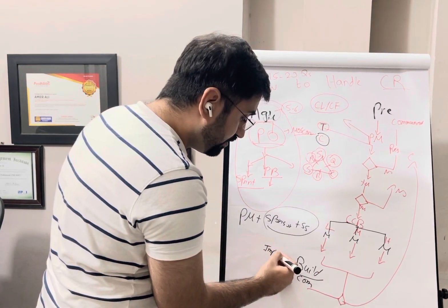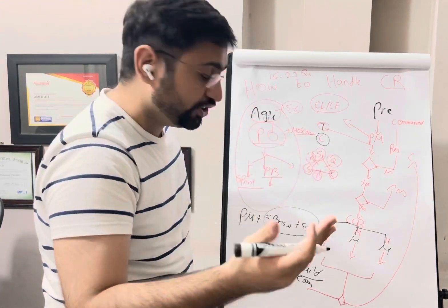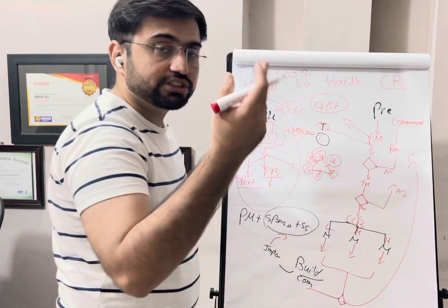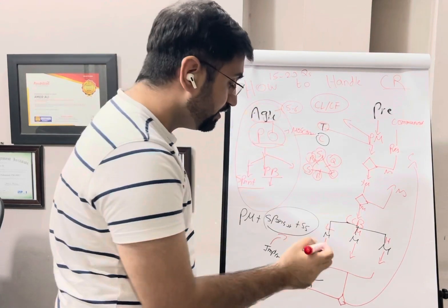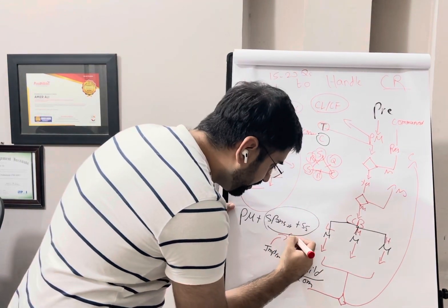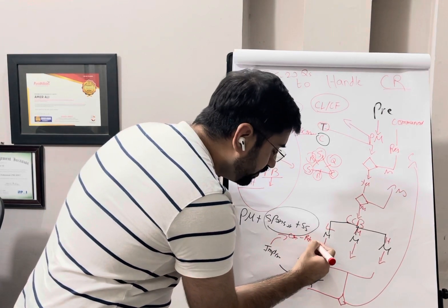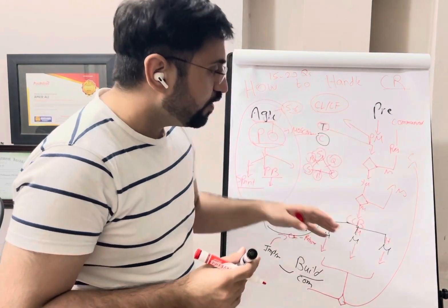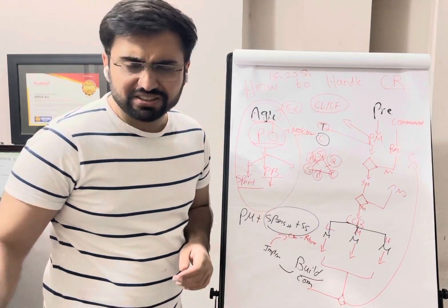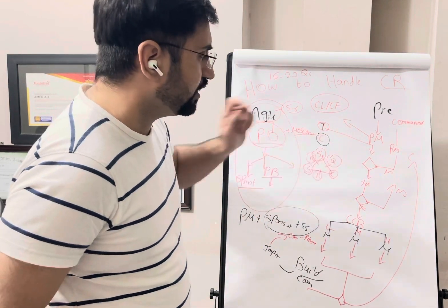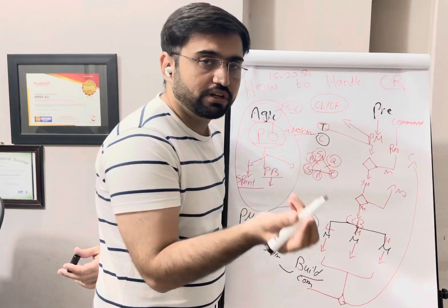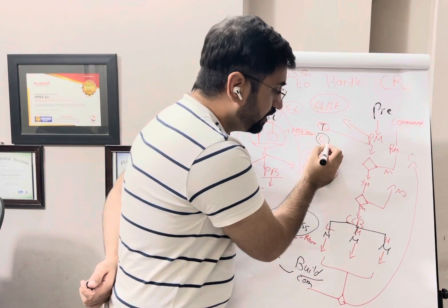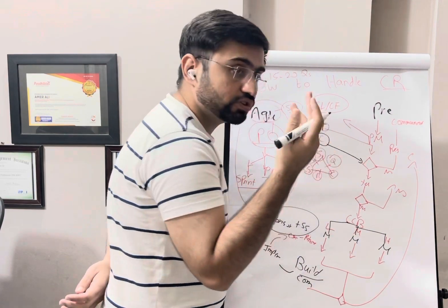After planning, you implement the change in execution — the actual change is carried out. Once implemented, you communicate to all stakeholders that the change has been implemented. You then rebalance, and continue monitoring. The process repeats as new changes come from team members or stakeholders. There is a slight difference when a change comes from the customer — it must always be in an official format.